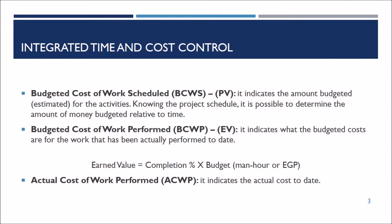Planned value, or budgeted cost of work scheduled, indicates the estimated budgeted amount for the activities at a certain time of the project. Therefore, you are able to know the amount of money budgeted relative to time.